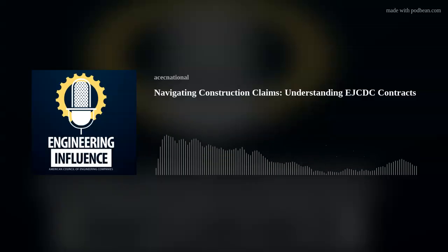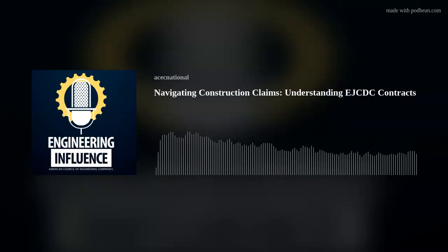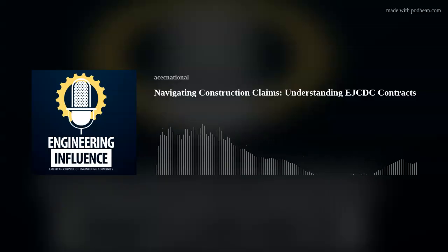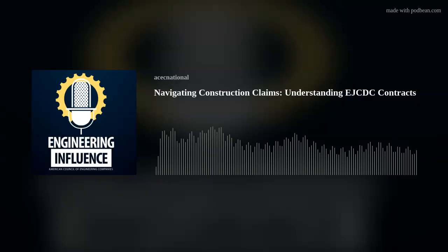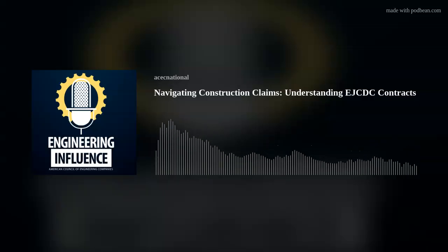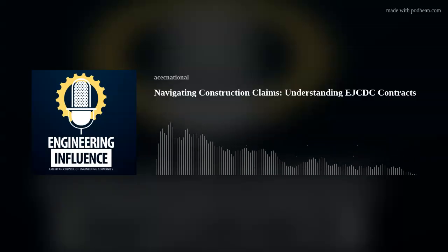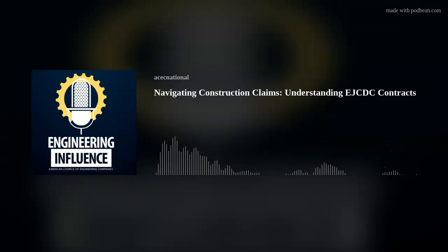Just in the interest of full disclosure, EJCDC would never claim that its model language is perfectly suitable for all situations, which is why we always recommend that consulting engineers that are tasked by their clients with developing the Division 0 or front end, as it's sometimes called, documents of a set of construction documents, that these always be sent back to the owner when they're initially drafted with a recommendation that the owner carefully review them in concert with the owner's own legal counsel to make sure that they're consistent with laws and regulations, the owner's own procurement policies, and so on.